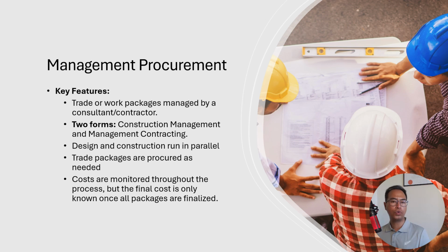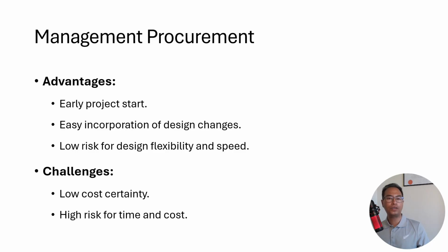Costs are monitored through the process, but the final cost is only known once all the packages are finalized. The advantages include early project commencement, easy incorporation of design changes, and low risk for design flexibility and speed. However, the challenges are low cost certainty and high risk for time and cost. This method is ideal for complex projects where flexibility and speed are critical.